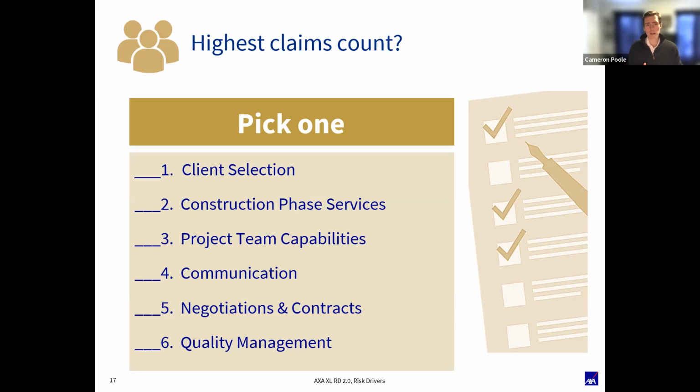Professional liability policies have what's called a contractual liability exclusion. It's an exclusion that says the insurance carrier doesn't have to cover a claim if you have committed to something that you would not have been held to in the absence of a contract. So pretty much, if you didn't sign a contract, you would be held to the prevailing standard of care in the area, right?